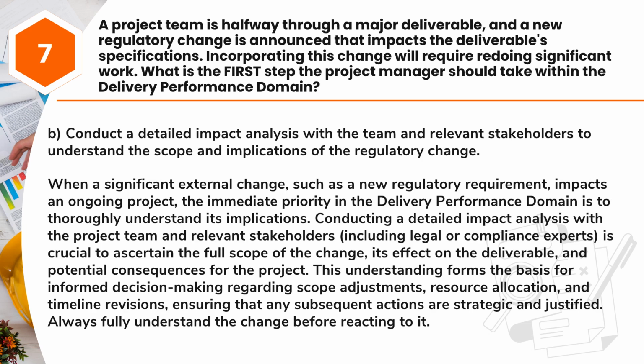Answer: B. Conduct a detailed impact analysis with the team and relevant stakeholders to understand the scope and implications of the regulatory change. When a significant external change, such as a new regulatory requirement, impacts an ongoing project, the immediate priority in the delivery performance domain is to thoroughly understand its implications. Conducting a detailed impact analysis with the project team and relevant stakeholders, including legal or compliance experts, is crucial to ascertain the full scope of the change, its effect on the deliverable, and potential consequences for the project.